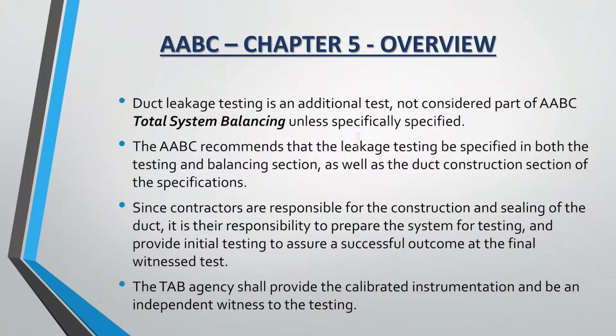We oftentimes have the installer pre-test the ductwork so that when the owners, commissioning agents, and balancers all show up to witness it, there's no failure rate. They all look good and they move along. We've actually rented our machine out quite a few times in the past couple of years to installers: here, you don't have one, but use ours and please get it done right. It helps everybody at the end.